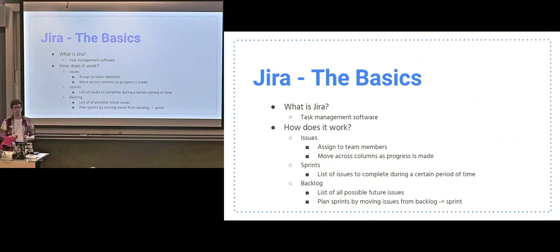And what we do is we make a list of every single issue that we think could be completed for this game and we are intending to complete. And then as development goes, we break those different issues into so-called sprints. So every 2 weeks, it's like, this is the list of issues that we deemed need to get done in this time, and you just go through that. But then the backlog also exists if you want to look at everything that we're planning on doing.